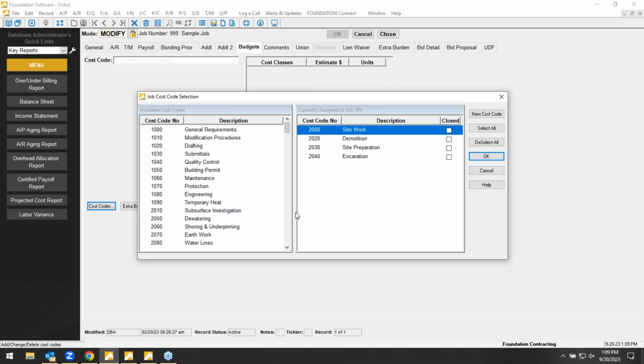So the check and balance here is from an entry standpoint, whether it's accounts payable invoices, time cards in Foundation, or time cards through the mobile app, users have the ability to select one of these 4 cost codes out of my 100 some odd code list. So check and balance wise, particularly on the labor side of things, they're not just picking some random cost code. It has to exist on that job's budget. Otherwise, they're unable to make that entry.